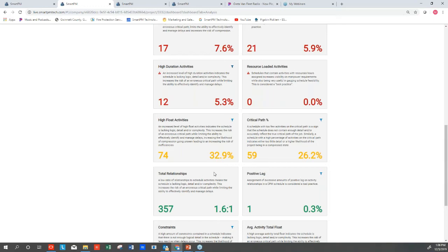That tells us that every activity has a place for the trade to go and something following them in suit. And that would definitely tell us that we would have an efficient plan. But when logic's missing and there's not enough of that telling somebody where to go and who's supposed to follow, then we have an incomplete schedule, which again can cause errors in the analysis.